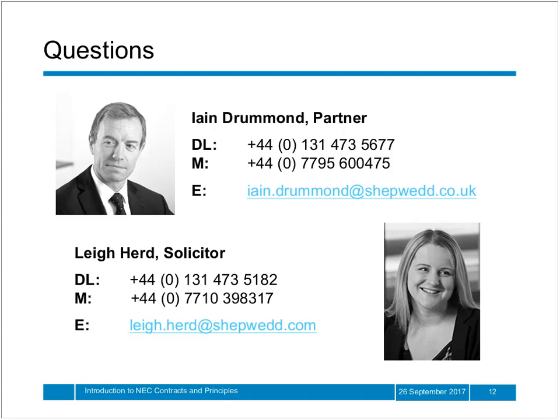It has been argued in a couple of cases now that the obligation to act in a spirit of mutual trust and cooperation equates to a duty to act in good faith, and that this might impose a duty of good faith, for example, when terminating a contract. But the courts have so far not accepted that argument, and I think it's probably widely acknowledged that the statement, as it is at the moment, doesn't go far enough to impose an enforceable obligation.